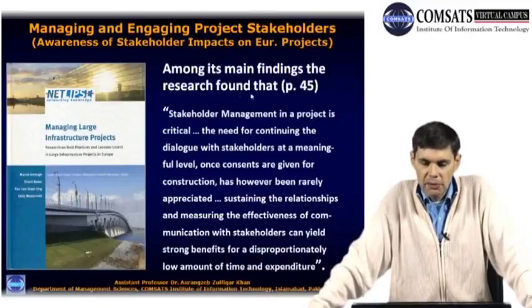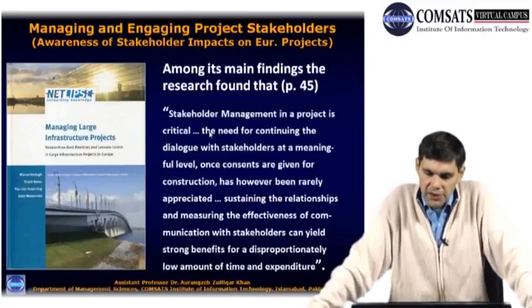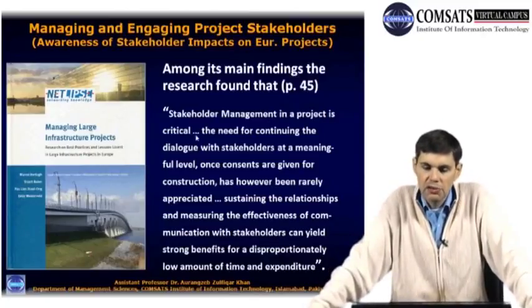Among the main findings, I'm taking a quote from page 45 of this book: stakeholder management in a project is critical. The need for continuing the dialogue with stakeholders at a meaningful level once consents are given for construction has, however, been rarely appreciated.